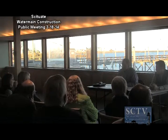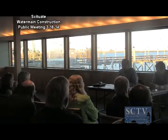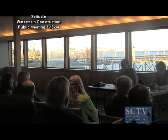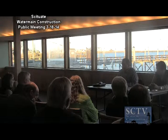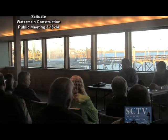They will be. Some of the streets we're going to look at to see to what extent we have to pave. We're going to see what the roads look like after the water lines. Sections of Country Way were just paved maybe about 6 years ago. So if we can patch those and maintain those roads in good condition, we will. We're trying to avoid doing full depth reconstruction on every street, because that takes out of the money that we have to redo the water lines. The less asphalt we do, the more we can spend on the water lines. Roads will be in good condition, but if we can get around it, we will.